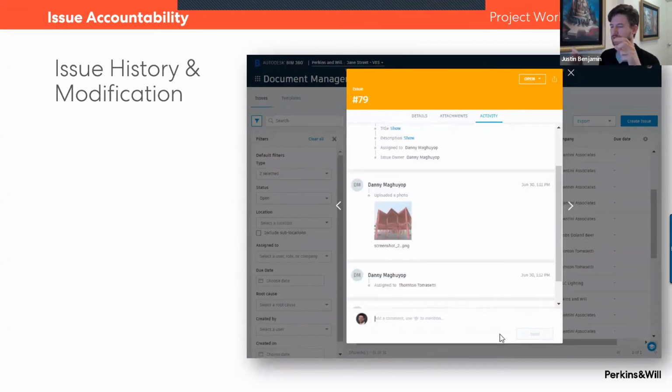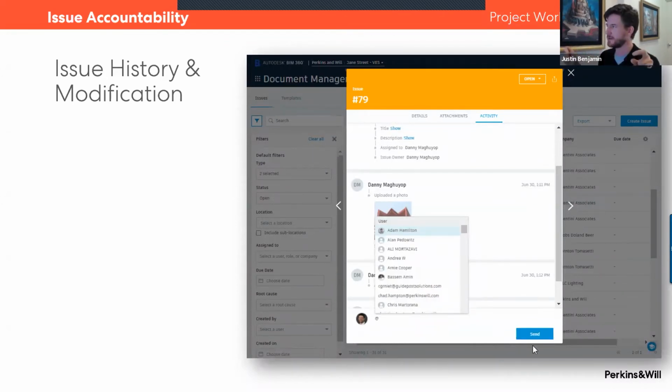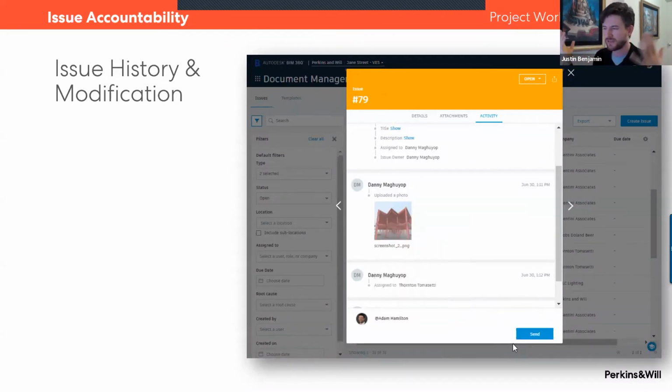We'll also essentially have an agenda to the meeting saying, okay, for the first 15 minutes, we're going to reach out just to mechanical issues, just the MEP engineer, say. And then the next part of the meeting will be structural. The next part of the meeting will be then fire or whomever.